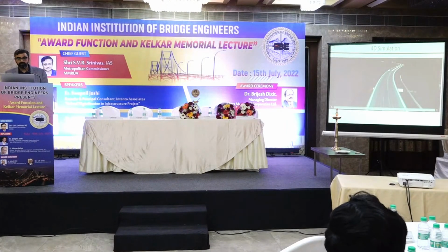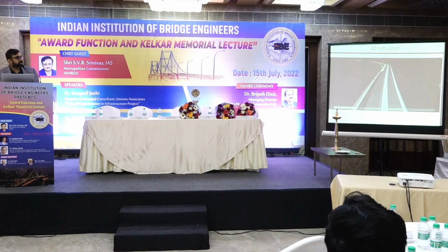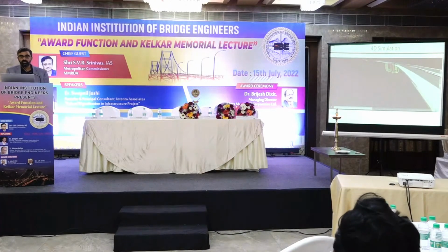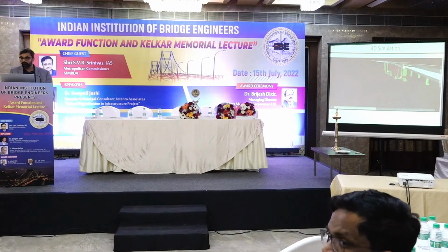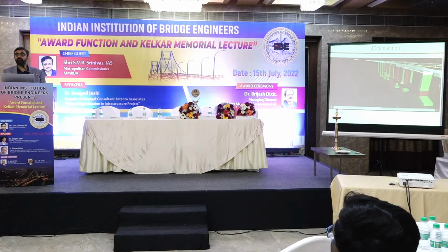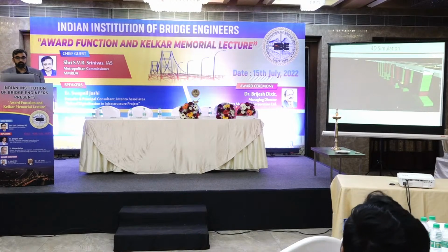Again, delay analysis, how it looks on the screen. This is the progress of the road works which are completed. I'll jump on to the bridge here, where we have done various cases where I have started early, where I have completed early. These kinds of cases are mentioned here at this location. This kind of delay analysis becomes an asset for us whenever there is a delay happening, for root cause analysis or mitigation. So this is another delay analysis focused on this particular road project which we have done.